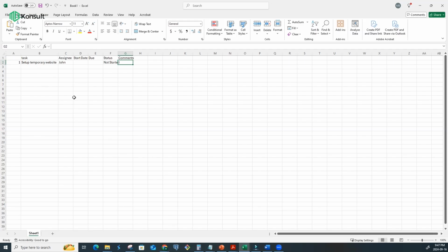So that everybody that is coming in, it can be something that will happen overnight. Everybody has access to this spreadsheet. As you do your stuff, you tell us, has it started? Then it becomes in progress. If it's completed, then it becomes completed. And if there are dependencies, we know that until this is done, you cannot start that next one. On a good day, this is what you use Microsoft Project to do, right?